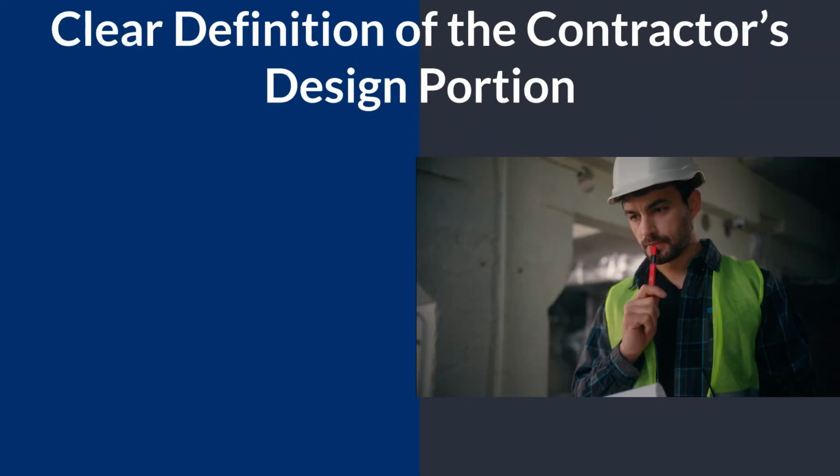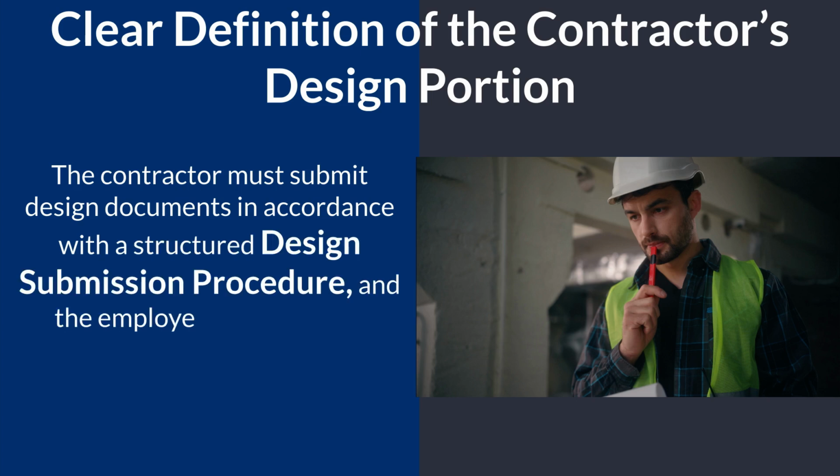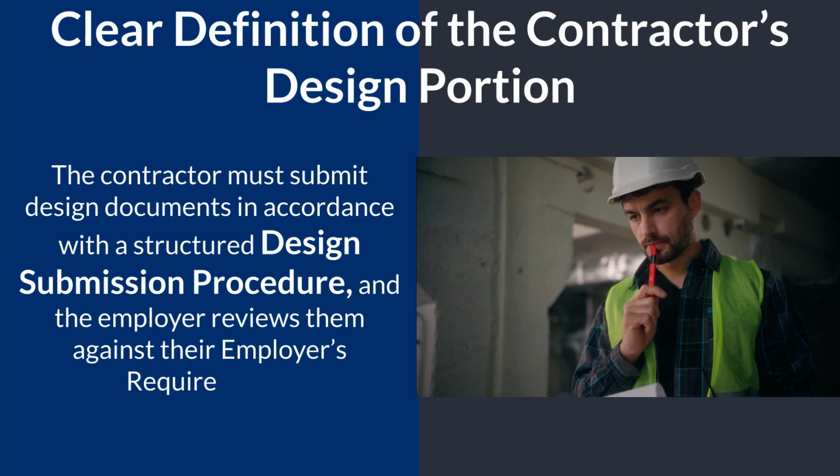Firstly, we'll look at the clear definition of the Contractor's Design Portion. The 2024 edition strengthens how the CDP is defined and managed. The contractor must submit design documents in accordance with a structured design submission procedure, and the employer reviews them against their Employer's Requirements. This clarity helps avoid disputes around approval delays, design compliance, and responsibility.